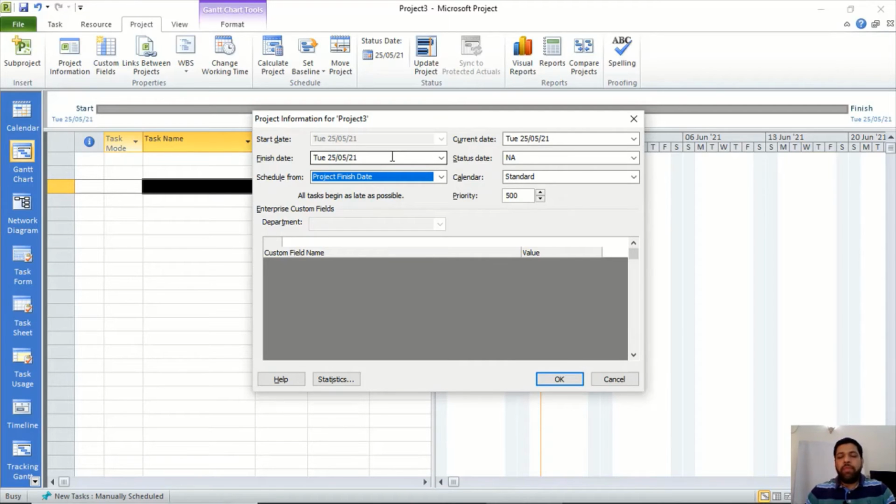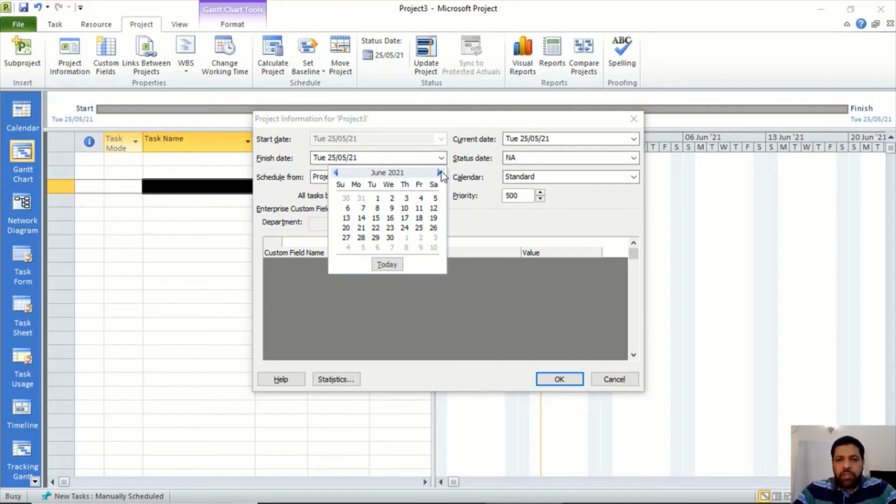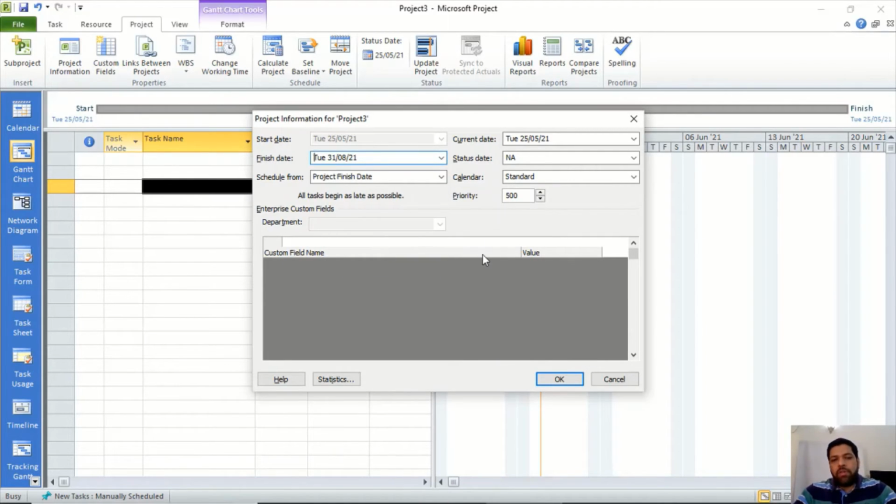For example, if your management or the customer has asked me to provide and close this product or project by 31st of August, you will set the project finish date. The project is needed by 31st August and you want to schedule your project from the project finish date.